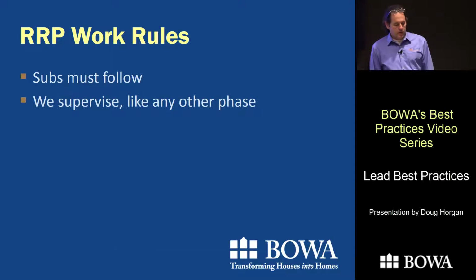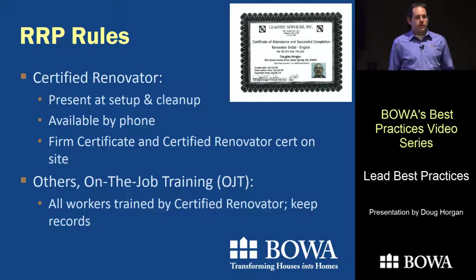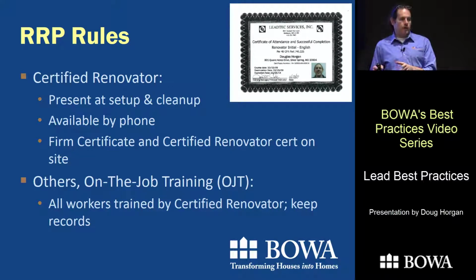Okay? Let me cover some of these work rules just so that project managers know what they should be looking at. The subcontractors have to follow these. So first of all, there's a special role in this rule. There's someone called a certified renovator. They'll have a certificate with their picture on it. It's supposed to be on the job site with them while they're working. They're supposed to be present while the setup is being done and while the cleanup is being done, and they're also supposed to be available by telephone anytime in the middle. Those renovators can train other workers to do the actual work, but this certified renovator has to be on site at the beginning and the end for the setup and cleanup. Okay?